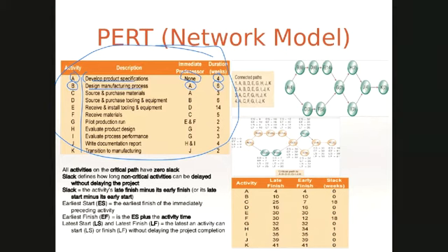After that is activity C, which is source and purchase materials, which also needs A, which means that 2 activities suddenly both need A, so both of them run in parallel. Whenever you've got 2 similar predecessors, you know that they basically are running in parallel.